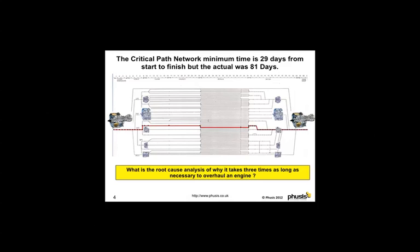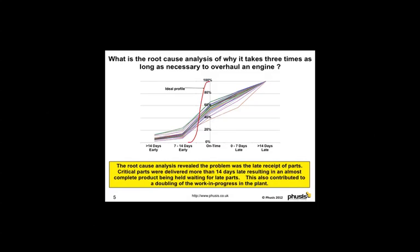Root cause analysis will help identify where the problems are. Nearly always at the top of the root cause analysis is the late receipt of parts. This is the delivery profile where only half of the replacement parts are delivered on time. 30% of parts are more than one week late and 10% of parts are more than two weeks late.